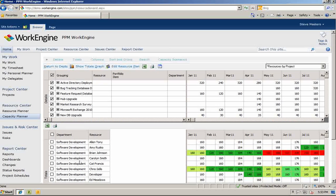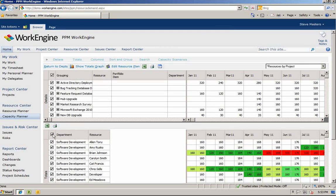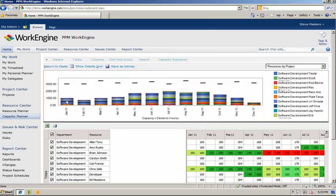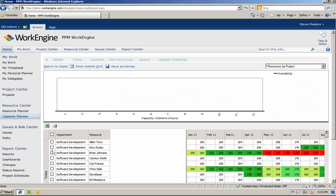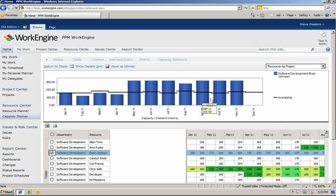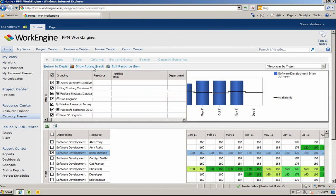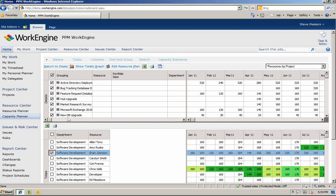In the lower section, you can see all of your resources with both their workload and capacity. You can also select your resources and view a workload versus availability chart by clicking on the show totals graph button. Here you can see that overall, your software development team is under allocated. You can also drill into individual workload. Here you can see that Brian Johnson is over allocated May through November.